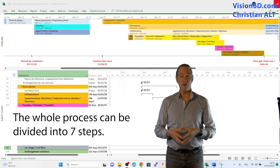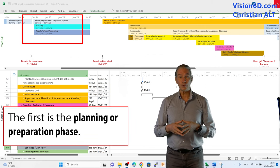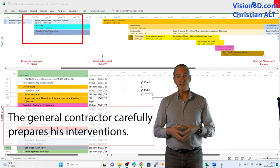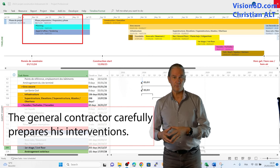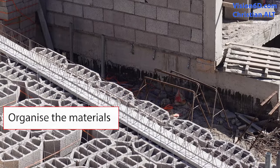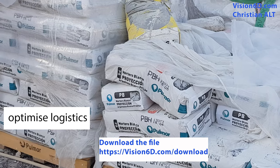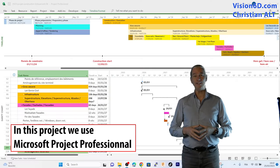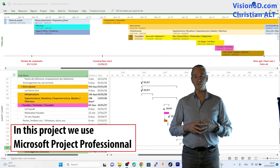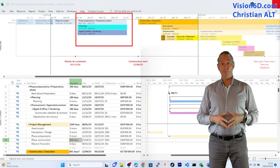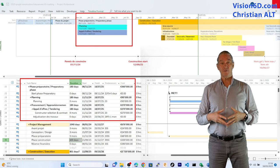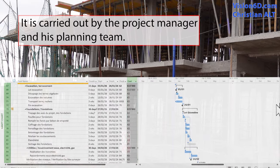The whole process can be divided into seven steps. The first one is the planning or preparatory step. The general contractor will carefully prepare all the necessary elements and interventions. He organizes the materials in order to avoid waste, optimize logistics, reduce costs, ensure the safety of those involved and save time. The planning phase consists of planning all the necessary work that the contractor will carry out to complete the works on site. For our example, the construction of a set of homes, the preparatory phase lasted a bit over six months. It was performed by the project manager and his teams.